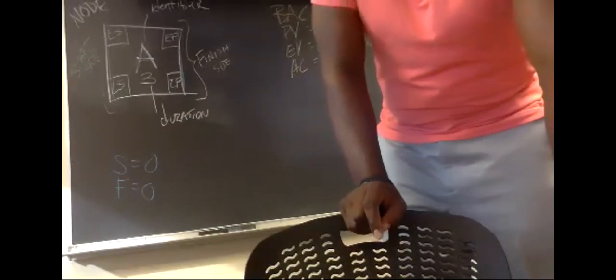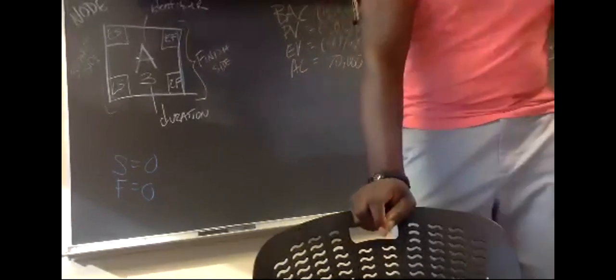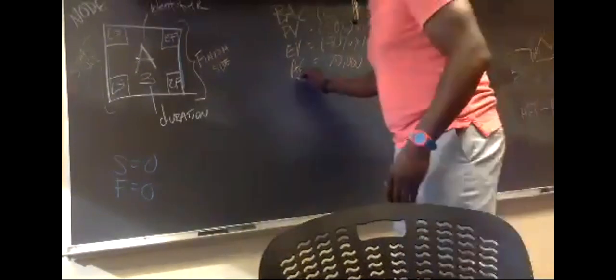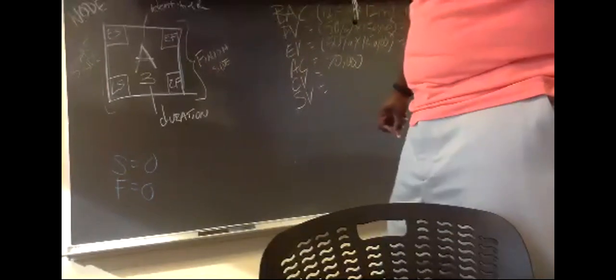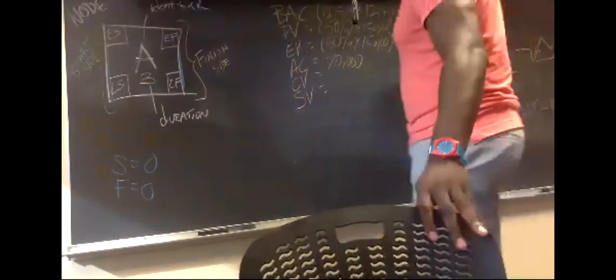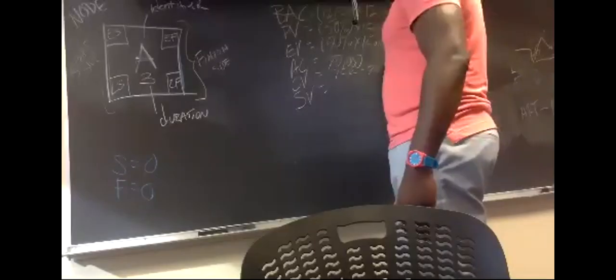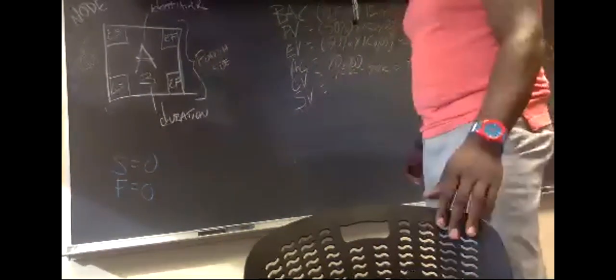All right. So let me go through really quickly, and we're gonna finish up, and then I'll move over to my room. I'll clean the board, and I'll move over to my room for Q&A. So now the next ones are CV and SV, cost variance and schedule variance. Cost variance is EV minus AC. EV 75K, AC 70K. That is, somebody yell it out. 5,000. 5,000, very good.